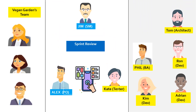Let's move on to the next event: Sprint Review. The team continued to develop and test the committed user stories. Sprint Review happens on the last day of the sprint. The purpose of the Sprint Demo is to showcase the product increment completed in the sprint. Attendees were the PO, Scrum Team, Scrum Master, and additionally Jane and her team from Wagon Gardens. Alex, the PO, kick-started the session and conveyed what was completed in the sprint, and Kate, the tester, gave a demo of the developed functionality for registration, login, and browse features. Jane and her team were quite happy with the progress and the mobile app screens. One suggestion she made was that the font be modified to be in line with the restaurant's website. Phil made a note of this feedback and logged a user story to be picked up for correction during the next sprint.